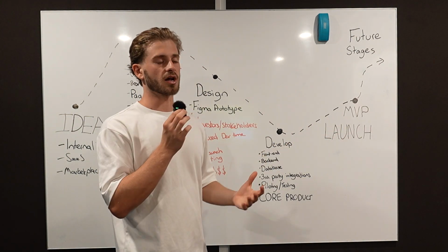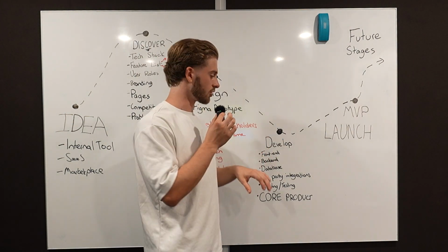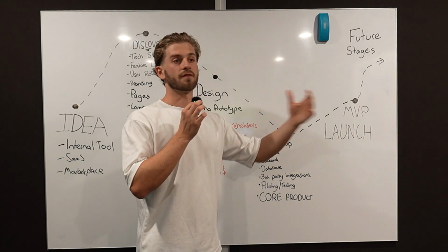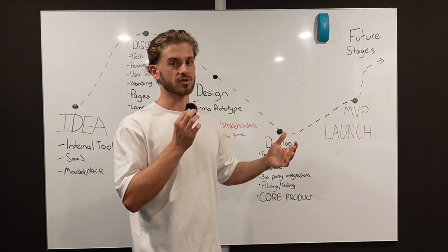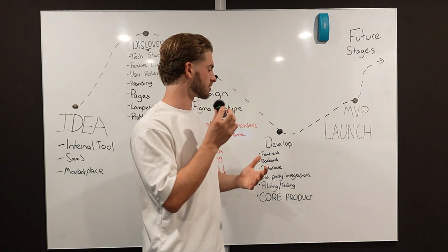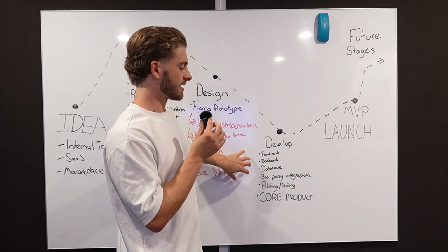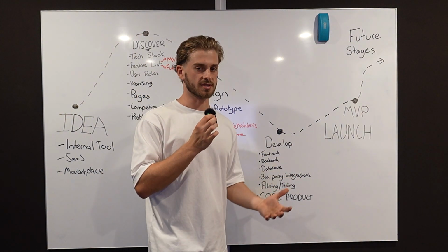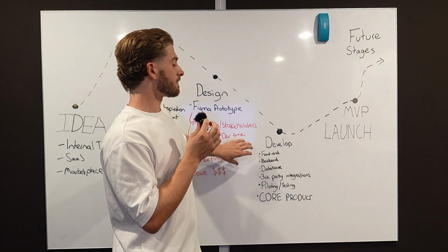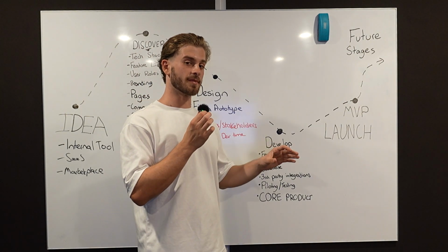So certain data might come in formats that don't work that well with your application, or there might be server issues, all sorts of errors returned by that API that we need to manually handle and display appropriately to the user. And so it takes a little bit of time to set those things up often, and it can tend to drive your prices up.